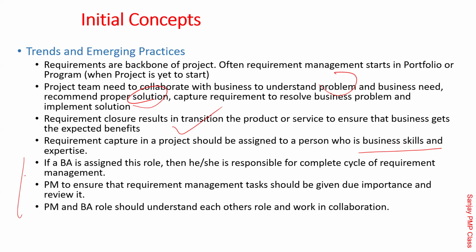One very common thing is that when there is a business analyst, the project manager and business analyst need to respect their own boundaries. Typically, for delivering the project fast, the project manager will insist the business analyst cut down the requirement time. If the business analyst says that I will need 8 days of discussions with the customer to freeze the requirement, the project manager says, can't you do it in 4 days? Now remember that the 4 days you are trying to save here could result in a huge change request and rework later. Are you realizing what I am trying to say? Time saved in requirement capture sometimes ends up getting very serious later.